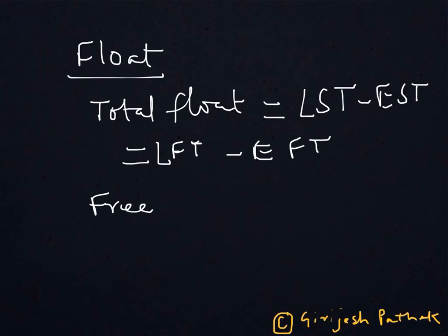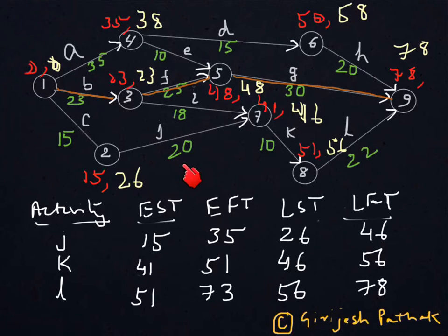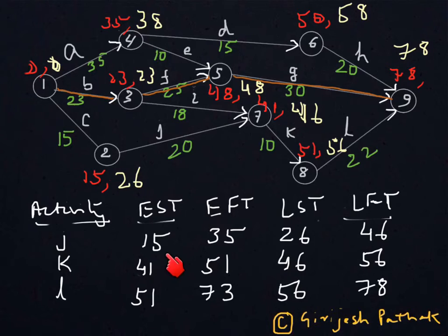Let us see this in more detail with the data. Free float means that the subsequent activity's earliest start time should not be disturbed by this activity. Take the example of activity J. The earliest start time of J is 15 and the latest start time is 26, meaning 26 minus 15 gives 11 days as total float for activity J.